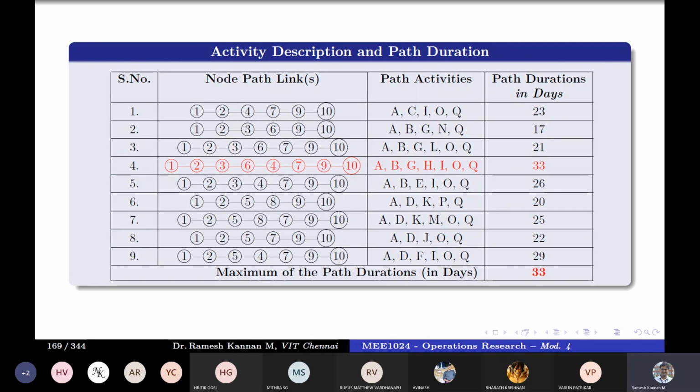Once you take much longer for the completion of the critical activities, then your project gets delayed. And if you finish early, it may not be a serious thing, but it is not really possible, since they have a zero buffer. How can someone finish it early unless extra manpower is put in or something like that? So those kinds of concepts are what basically a critical path and critical activities are.